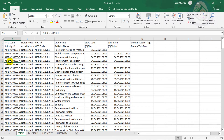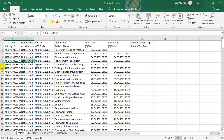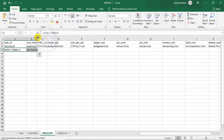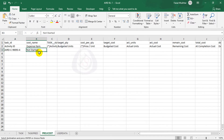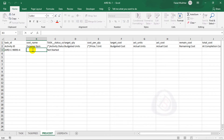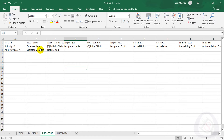I go to the Procurement activity, copy its Activity ID — for example C90 to C93, Activity Number 4 — and paste it into the Activity ID column. I cut the status and paste it into the Activity Status column. For Expense Item Name, I will enter a vibrator machine as an overhead expense.